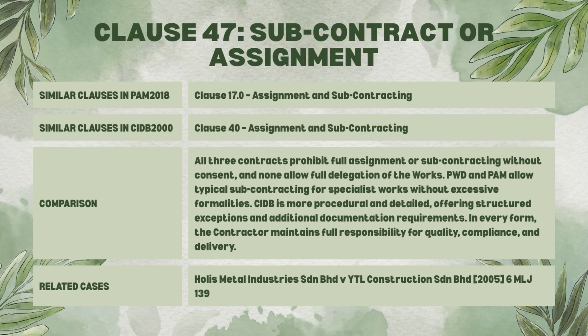The next topic is subcontract or assignment. Based on PWD, it is clause 47, PAM contract clause 17, and CIDB clause 40. All three contracts prohibit full assignment or subcontracting without consent, and none allow full delegation of works.